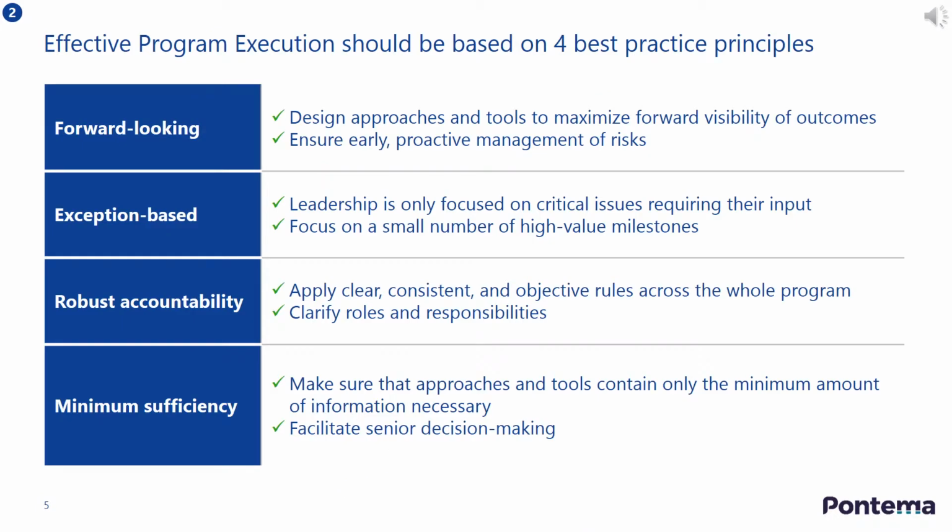The program execution process is the responsibility of the PMO. The process should be based on 4 best practice principles. Firstly, it should be forward-looking, meaning that the PMO should maximize the forward visibility and planning of all likely outcomes to ensure early, proactive management of risks. Secondly, it should be exception-based, meaning the PMO should focus only on the critical issues requiring senior input and effort,